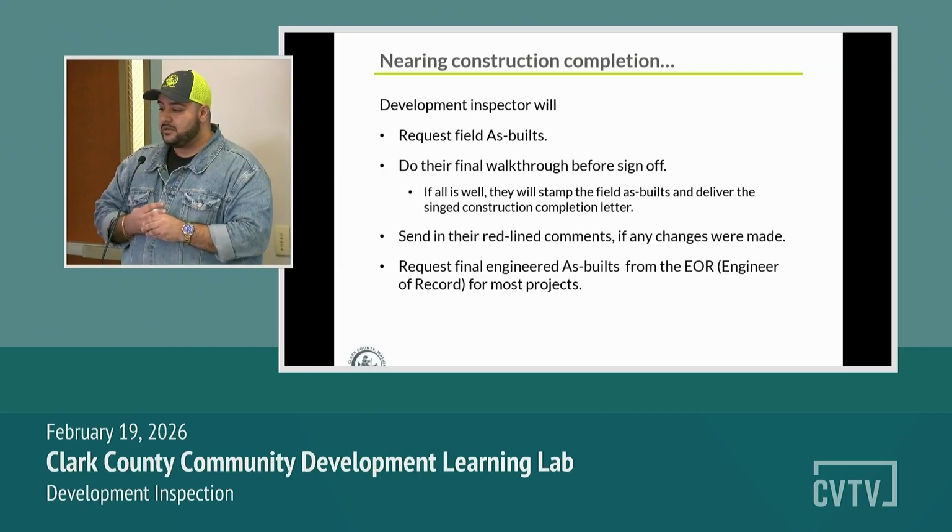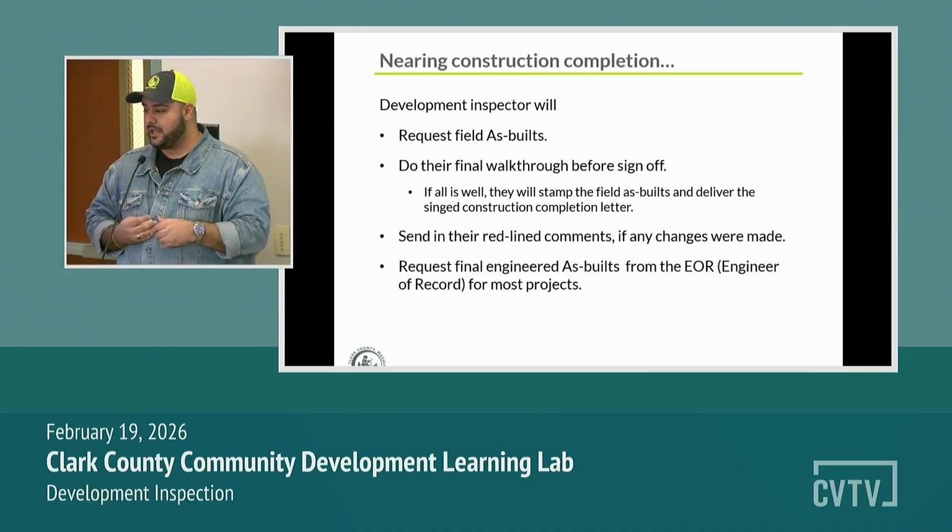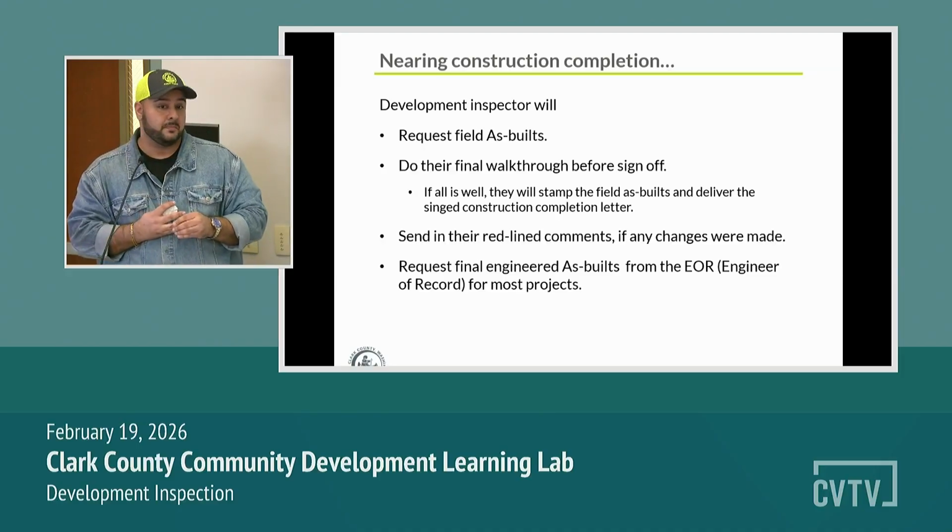And so the inspectors will do their final walkthrough before they sign off on their portion. If all is well, they'll return that back to me in the office, and I will have the field as-built and deliver them with a construction completion letter.